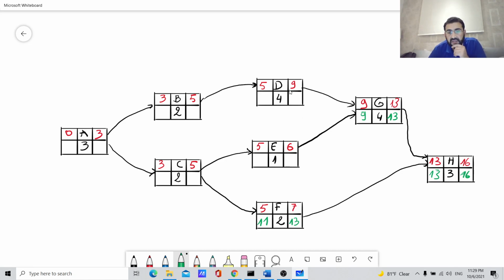What about G now? Now, for G, we will do the same thing. We will just copy the latest start date of its successor, and here we will get 5. So here we get 5. 5 minus 2 is 3, and here we will get 3. 3 minus 3 is 0. Okay. I'll go back to that later. Maybe this is not correct 100%. So this will be 8.